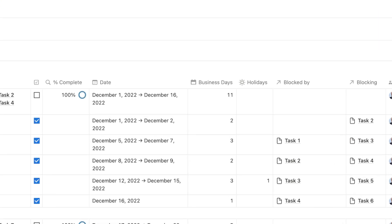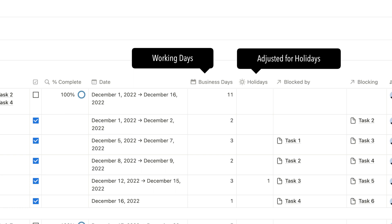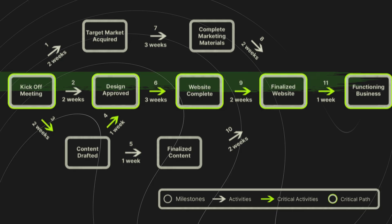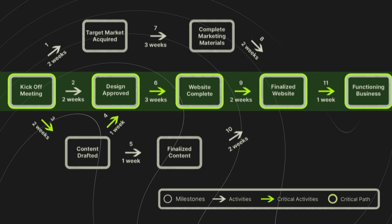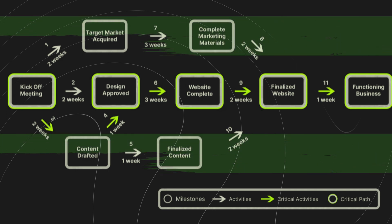Projects are dependent on working days and holidays, not calendar dates, and there is something called critical path for project managers. Critical path is an indicator of the minimum time it will take to complete a project or a sprint and not all tasks form part of that critical path. So if there's a delay that impacts a critical path task, it'll impact the project and the sprint.